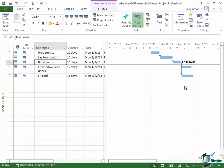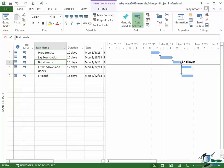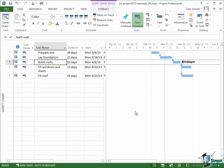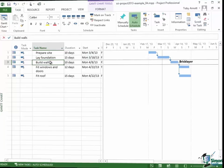Now you may not quite see the same as me here, but if you're still using a default installation of Project 2013, you should see something pretty similar. And one of the things that's apparent is that you can now see the word bricklayer next to the task in the Gantt chart. Now exactly what you see in a Gantt chart is something we're going to look at in some detail later on. You can customize and format a Gantt chart. But basically by default you would normally see the names of the resources that are used in a particular task listed next to the Gantt chart bar. Now we'll be able to change that later on but for the moment it's actually quite useful because we can see that we've got a bricklayer resource allocated to the task of building walls.